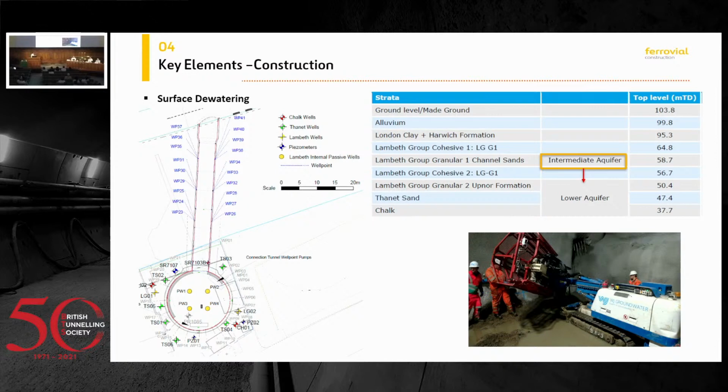We also set up four relief pipes that reach four meters below to make sure that you reach this aquifer. In case of an overpressure, the pressure relief goes through there, and we just put some granular material to avoid any blockage. And this worked quite well. We went quite easy and nice and smooth in Heathwall.